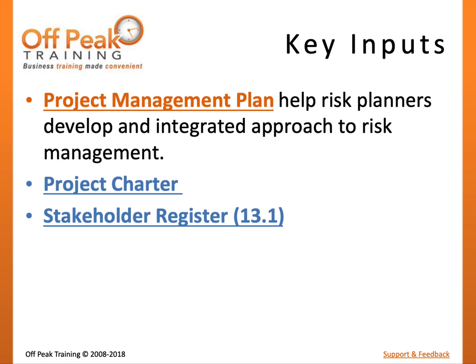The project charter is an input, as it may have captured some high-level risks that were known during the initiation of the project. The stakeholder register is a list of identified stakeholders and details about each, such as their interest in the project, involvement, and ways that they may affect or influence the project. This may provide useful insight to stakeholder tolerances for project uncertainty.